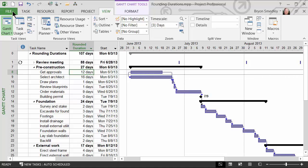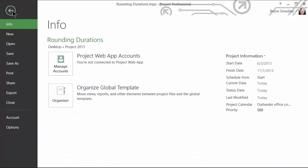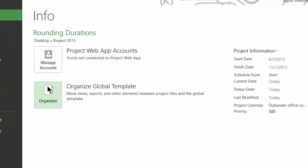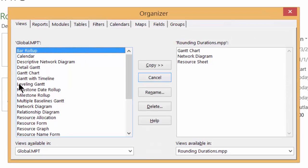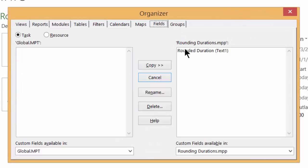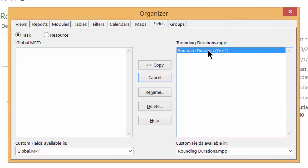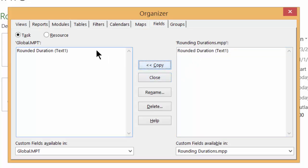So to do this, click File, and then choose Organizer, and then switch to the Fields tab, and then take Rounded Duration and make a copy of that into your Global.MPT Library. This will now make this field available to all of your projects.